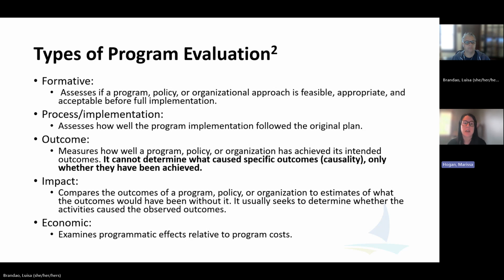So process evaluation is assessing how well the program implementation followed the original plan. You laid out in your grant proposal, I'm going to do these activities, which hopefully are going to lead to these outcomes, which are going to help us reach our overall goal that we applied for. So the process is saying, we said we were going to do these activities. Did we do these activities? Yes or no? Did we do them in the way that we intended to do them? That's understanding process and evaluating that.